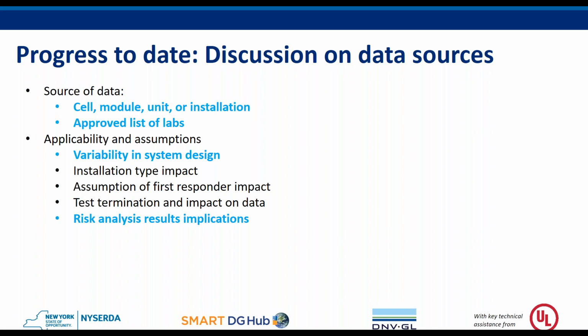So in that case, typically speaking, any laboratory could conduct this test as long as it follows and documents it following the letter of the law of the test itself. However, for New York City, we want to make sure that we can validate the results and that the tests are being done by quality and otherwise certified laboratories. So DOB is currently going through a process to determine what types of proof and what types of certification or accreditation would be required for the laboratories to accept the data from. It's recognized that it's an issue, and it's important to understand where you can go and whose data you can trust, and we're working on addressing it.